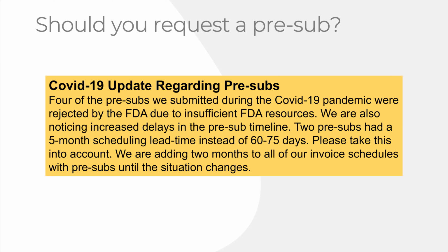Silence. Okay. Just as an aside, I used to run a molding facility at multiple companies. I've designed molds. I've run molds. I do write the validation protocols. I know what I'm talking about. It's not going to be 4 weeks for this really big mold for this really big plastic part. And of course, they want it to look perfect because it's cosmetic. It's the outside housing of the unit on a brand new flagship product. It's not going to happen. So their whole entire project was completely busted by 8 weeks, 2 months, right off the bat, just because of the mold. And there were so many other problems with it.